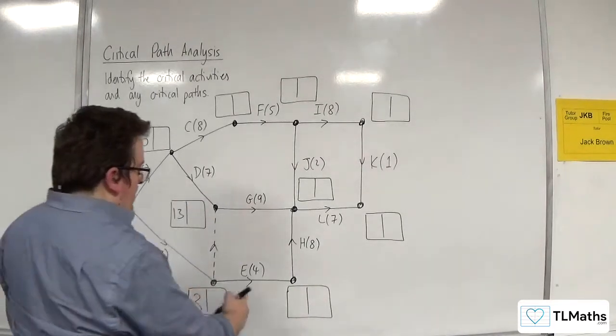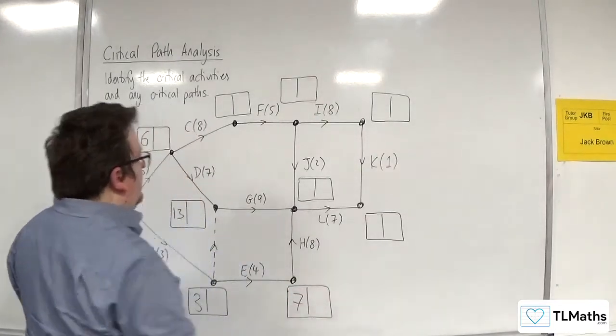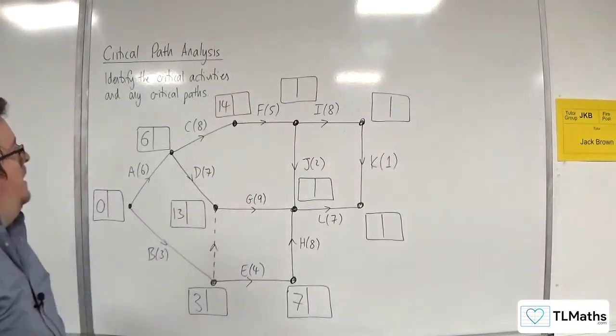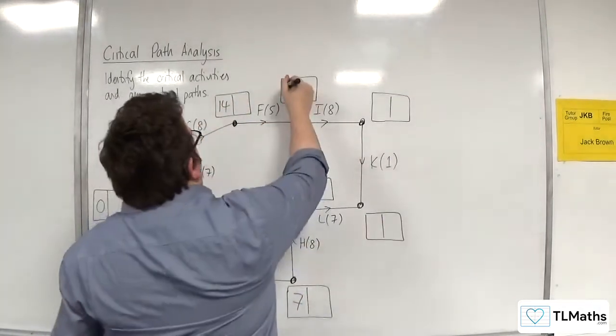So 3 plus 4 is 7. I'll do that one next. We've got 6 plus 8, so 14. And we've got 14 plus 5, so 19.